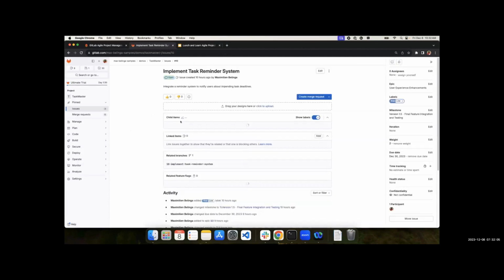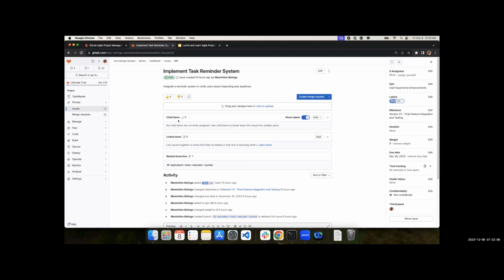So you're talking about linking tasks, linking issues, right? If I'm not mistaken. More than linking. A dependency is not just a link, but this can't start until this is complete, or better yet, this can't start until this is 80% complete, which is very commonly the case as you're doing project management, right? Okay.